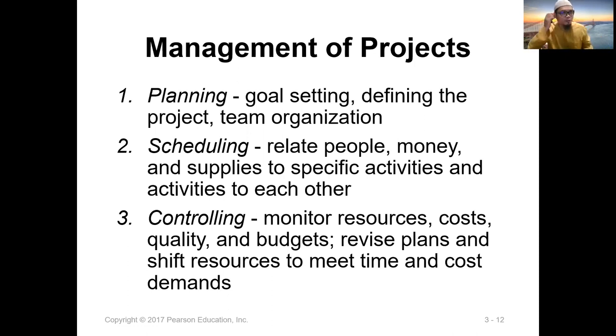Actually you will face what we call a short meeting. In the short meeting we have a simple form, or what we call a board. On that board we have sections. Section one is about the issues. All the workers highlight the issues they have. We make it a table. The first column is about the issues, the second column is about the problems. What's the problem? Yes, we know we have a lot of issues. So what are the problems? We need to summarize and make a statement of the problems, so that we can solve the problem.